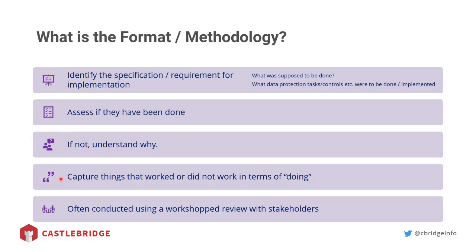issues and risks? Again, a smart DPO who's using a post-implementation review methodology, or has managed to integrate data protection questions into the post-implementation review methodology that organizations should be following as part of their project management methodology, can get people to understand the benefit of engaging with the DPO early by getting them to realize that the reason things didn't work was because no one asked the right questions. Usually it's conducted in a workshop type review.